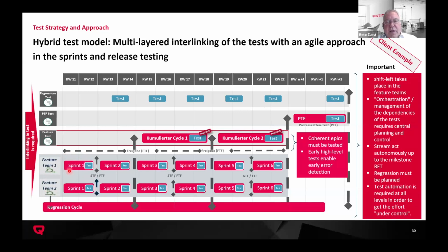We gave them a clear idea how to build up testing. So we built up a policy. We wrote down how to build up testing, what the definition of done is, that the sprint is not achieving the definition of done just because a functionality is there. The definition of done is given if the test cases are defined in a method-based approach, if the test cases are documented in a given system, and then ideally also executed and on green. So that's the way we go for it.